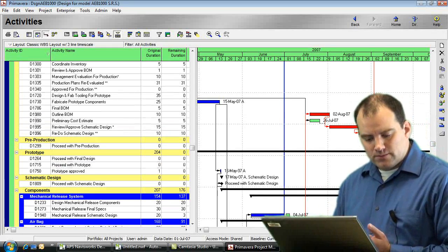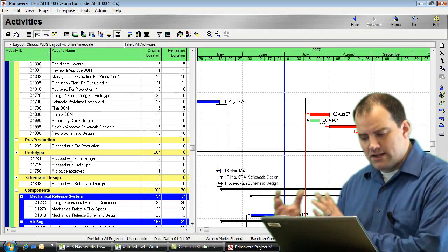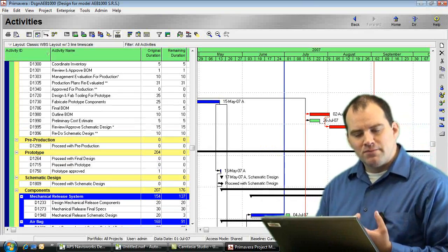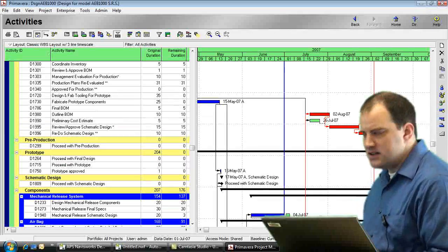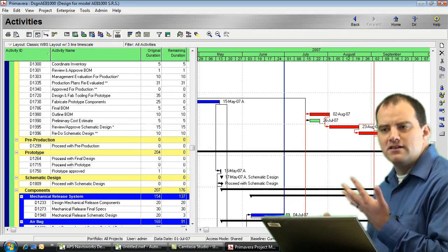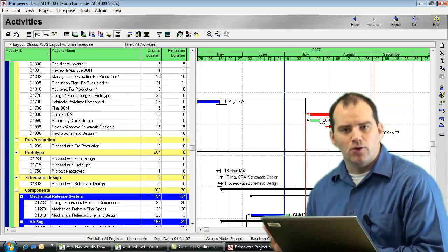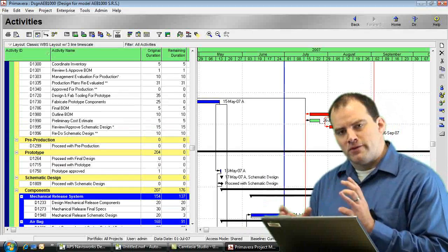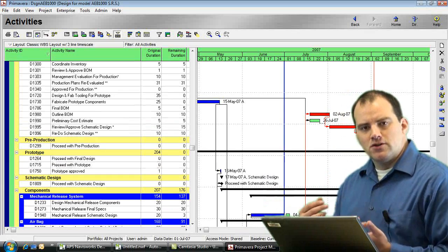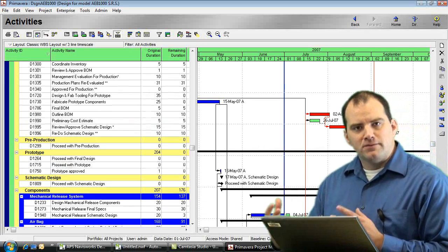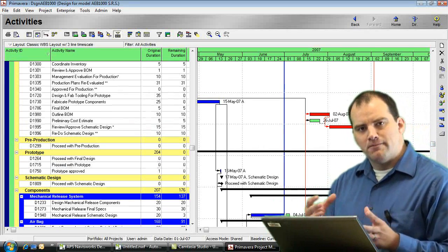So with Navisworks, what we want to be able to do is take this rich information from our schedule and integrate it with our model so that we're able to show the components that are referenced by these specific tasks. For example, we have a specific task that might detail steel erection, or maybe it's excavation. We can associate that task with a group of elements in our model so that we're able to recreate that sequence of events and look at it from a holistic process, seeing how it impacts the model.